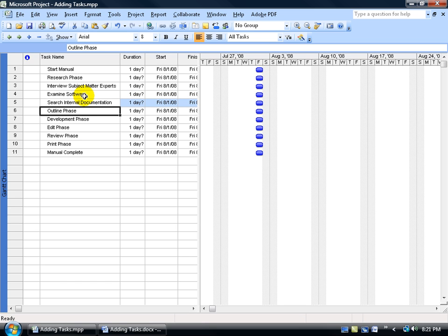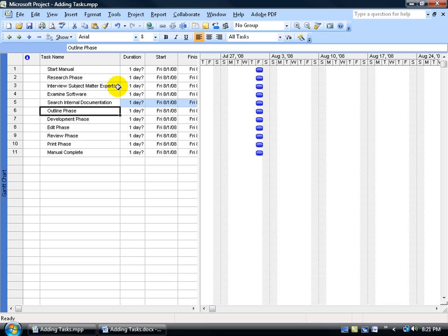Now let's see if this makes sense. I have my phases which are defined by me as my summary tasks and then below my summary tasks I have the subtasks which aren't defined by phases. So looking at the research phase, let's look at the subtasks. Interviewing the subject matter experts, that's research. Examining the software is research and then searching their corporate internal documentation is also research.